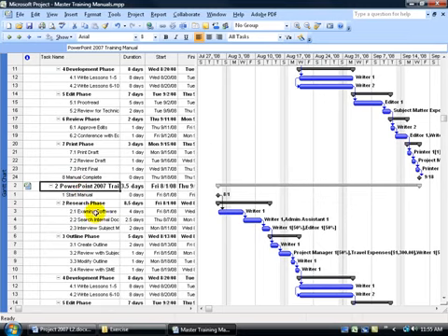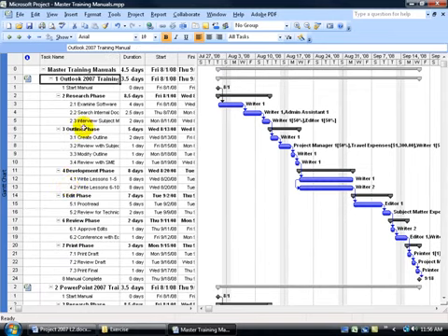We'll notice that the inserted projects are broken down here as this is the second project and this one's the first one. Well, what if I create my own custom WBS code, which also defines this is the first project on all the tasks for this project, and this is the second project for all the tasks on the second project here. In other words, I'd create a WBS code that says this is all project 1, and then I'd have a dash and continue on with the work breakdown structure.